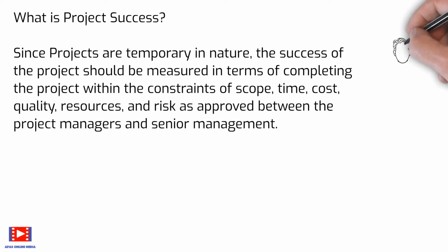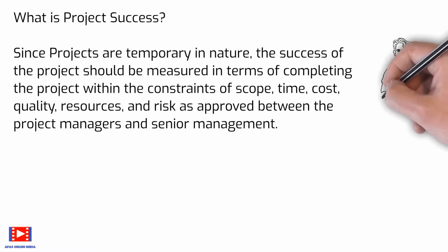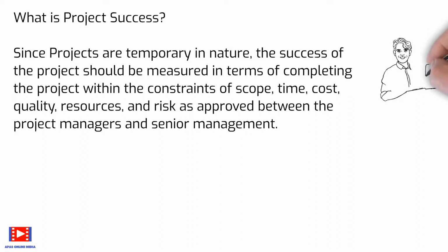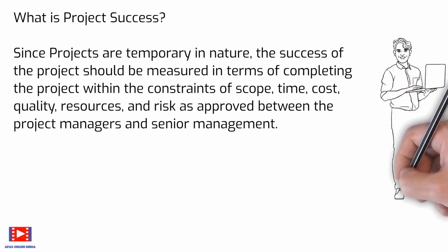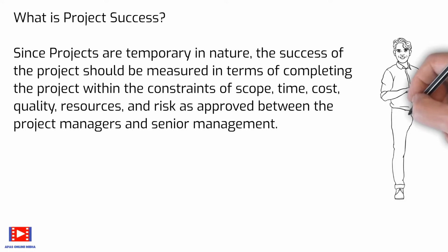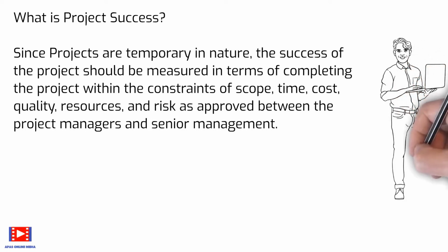To ensure realization of benefits for the undertaken project, a test period such as soft launch in services can be part of the total project time before handing it over to the permanent operations. Project success should be referred to the last baselines approved by the authorized stakeholders.